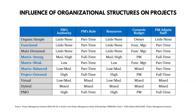Let's look at the structures in blue that we've already started discussing. In a functional organization, the project manager's authority is going to be little to none — the functional managers have much more authority. The project manager's role may be part-time, there may be little or no resources dedicated to those projects, and the functional manager controls the budget. Any administration staff for the project manager would typically be part-time. In these types of organizations, it's going to be very difficult for the project manager to be successful — it requires a lot more coordination and effort.